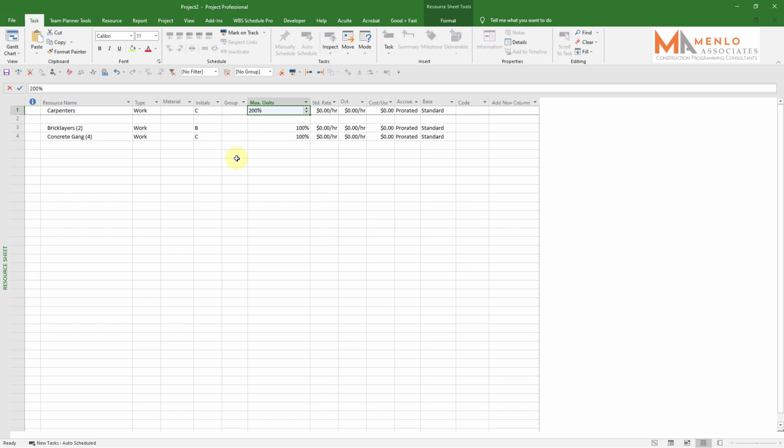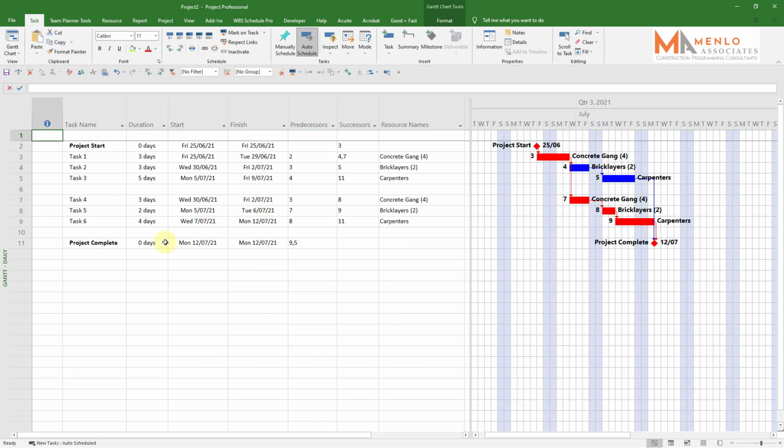So the work is not going to be over allocated until we get into the position where we'd maybe need a 3rd carpenter. If I go back to this now, you see the little red men have gone because essentially it's telling me I've got 2 carpenters. And as long as I don't go over 16 hours a day worth of work, because I've got 2 carpenters, it's not going to be a problem. If there was another clash further here, it's the same thing. I either add more bricklayers, add more carpenters, or the work has to wait.